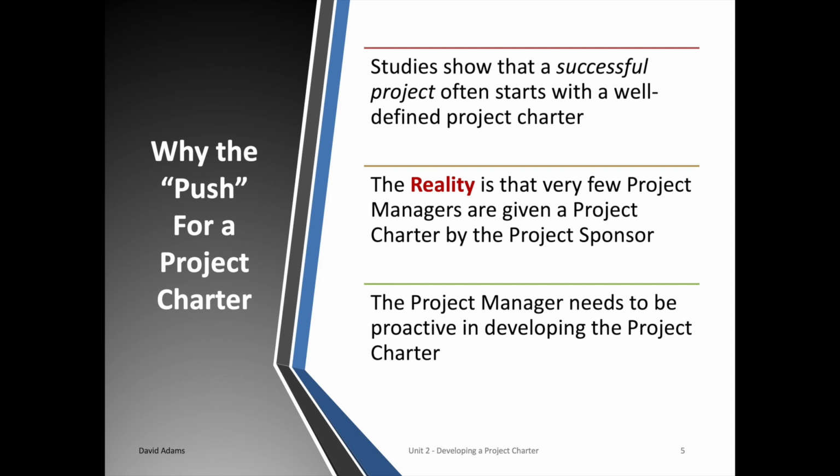So why is there a push for a project charter? Well, studies show that a successful project often starts with a well-defined project charter. From the very beginning, the project team can plan the project with the appropriate scope. That is, what's in and what's out. Without a project charter, it's possible to plan a project that goes way beyond what was expected.